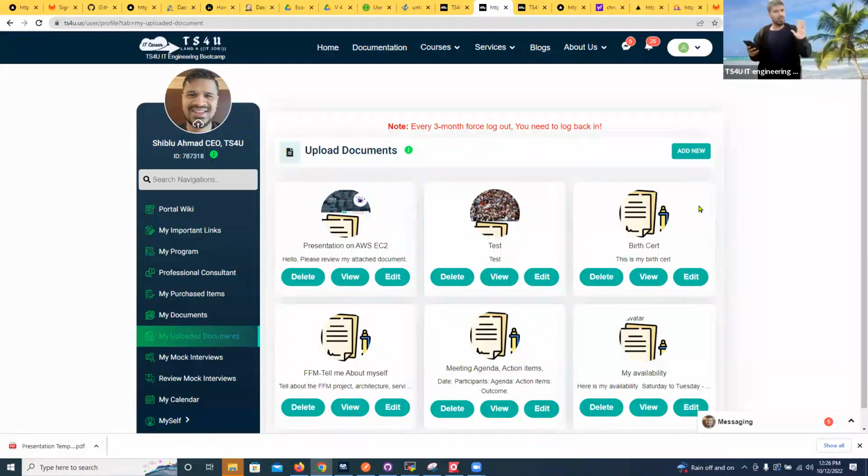There are multiple ways the user story points work. One is like the Fibonacci. Fibonacci means how long it takes. 8 hours a day. If something can be done in 8 hours, we call that 1 point. Done means, again, done means development, deployment, testing, and the show and tell. That means at least ready for the show and tell and push to production. That's called done. So if it takes 8 hours, then it is 1 point.